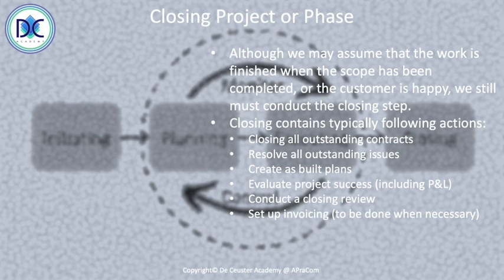We set up invoicing when we have the service completed. It's very important to send out an invoice because without invoice, no payment. And invoices don't have to be sent at the end. In certain cases, you may specify how you will invoice, for example, when you're updating services. How will you invoice? What are the principles of invoicing? How will you do that over the project duration? And you have to set up and send invoicing. If you have a repetitive service, you have to see that the monthly invoicing has been set up. And that's also a very important element. Of course, it has to be verified that it's going on correctly.